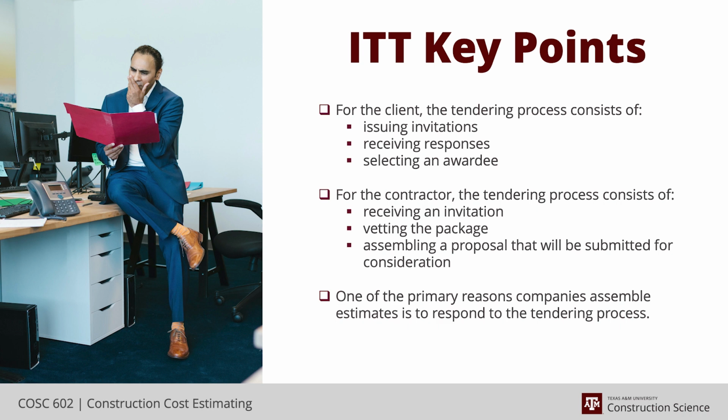And then there's other times when we've worked on check estimates, which we mentioned last week, because the project's already moving forward, but it seems like they have derailed. And everybody now wants to recalibrate the baseline that they are managing the job by. In that case, they'll call in the estimating department and they'll re-estimate the project, but they'll include expended costs to date, including those that are committed.